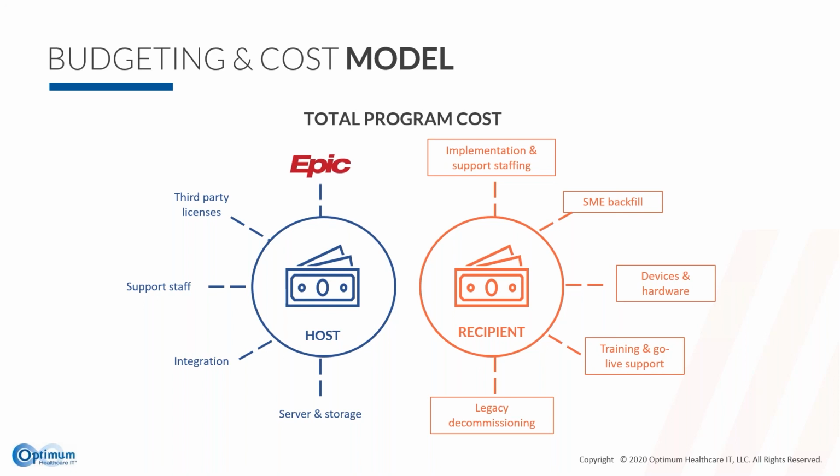And then finally, your legacy decommissioning as well. If you're replacing a legacy system, there hopefully long-term will be savings there, but it usually costs you a little bit to get that archived as a one-time cost and potentially as an ongoing subscription-based cost for the archiving system as well.